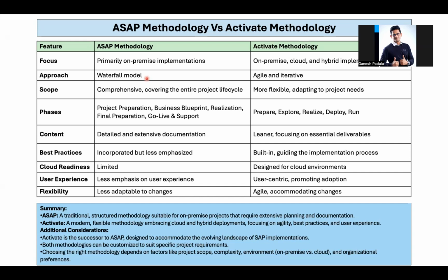So in the realization phase, okay, the first 3 weeks, we have to complete the entire system setup and do the UT. Okay, and from the 4th week to the 8th week, we have to do the system integration testing and roles creation. So like that, we used to do it. That was called a sprint. Okay, you have to divide into sprints like that.